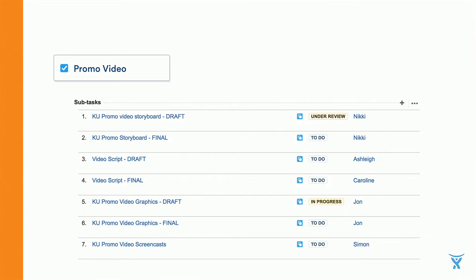And breaking that down further, she's going to need a storyboard, she's going to need a script to go with it, she's going to need graphics, and she's going to need screencasts of the actual product. All done by different people, and all needing to be orchestrated just right in order to hit a very specific launch date. And that's a lot of moving parts, right? So by using multiple subtasks that she can then delegate out to multiple assignees, she can allow herself enough buffer time between review cycles, however many there may be, so that she can hit her dates.